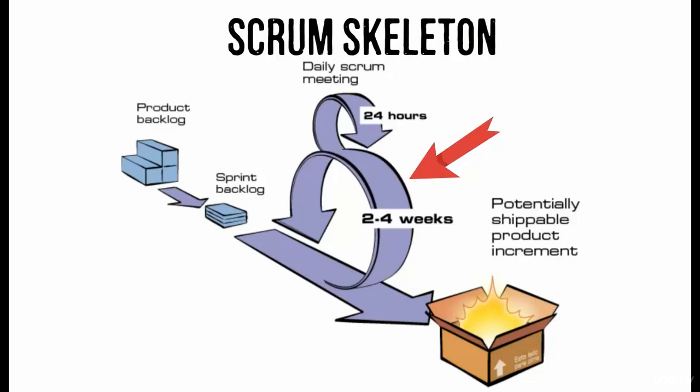These are like the miniature phases of the waterfall within the waterfall model, as described in my book, The Scrum Megapack. There is some gathering of requirements and updating of specifications before the sprint, followed by design, implementation, and testing. Above the large sprint circle, you will see a smaller circle. This represents the fact that every day the team meet to check progress and adapt their plan for the day in a daily Scrum meeting.